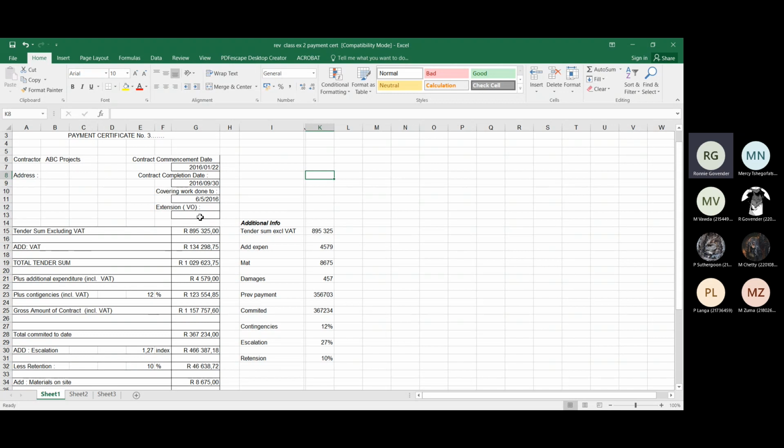And as you're trenching for the main, you realize that there's now a sewer pipe or something running which wasn't shown on the drawing, so you didn't price for that. So for you now to either divert that sewer pipe or to relocate it would cost you money. So for you to do that, you would normally tell the client, listen, we need to move this. The client would normally come out on site, or he might just ask you quickly, how much is it going to cost? And you say, it's going to cost 5,000 Rand. He might say, okay, it's fine, because we have what we call contingency. We'll take it off the contingency.